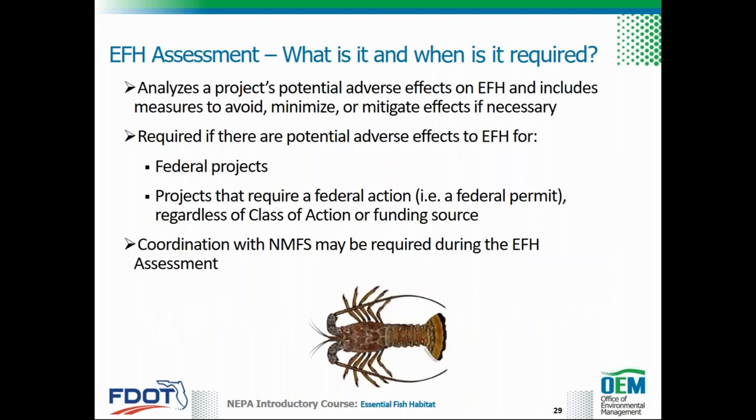An EFH assessment is an analysis of the project's potential adverse effects on EFH. If necessary, it will include measures to avoid, minimize, or mitigate those potential effects. An EFH assessment is required if there are potential adverse effects to EFH for the following types of projects: federal projects and projects that require a federal action, for example, a federal permit, regardless of cost of action or funding source. As the agency with jurisdiction over EFH, coordination with NMFS may be required during the EFH assessment.